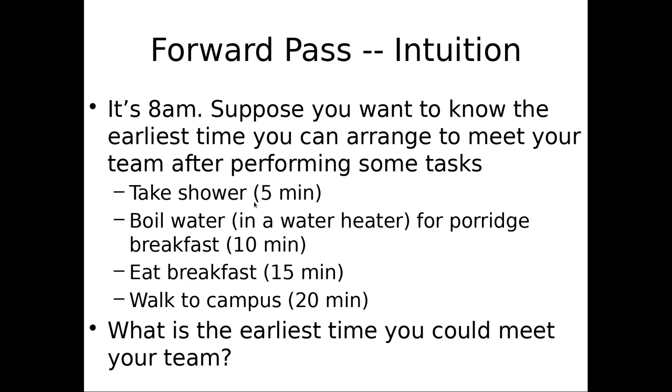Now, why is that better than just adding these up? What are you taking into account? You save 5 minutes because you could do these in parallel, right? Because there's a dependency. You can't eat breakfast while you're in the shower. These two have to be finished before you eat breakfast. You can't eat breakfast until the water is boiled. So you have to wait for the maximum of these two, right? So I'd argue it's 8:45. Right, because it's 10 minutes, from these two the maximum, plus 15, right, 25 plus 20, okay?